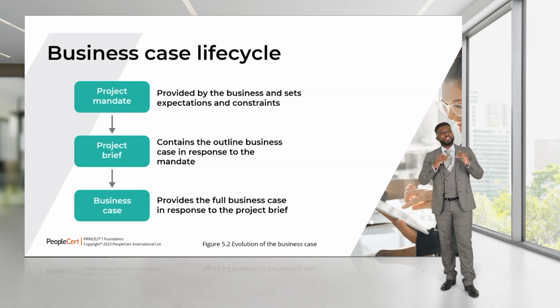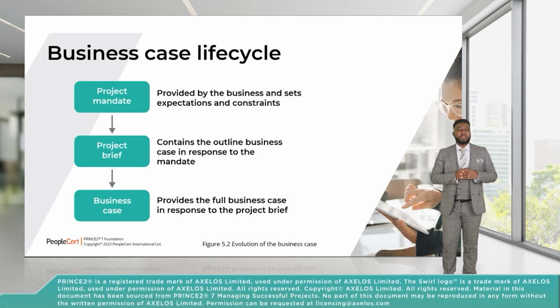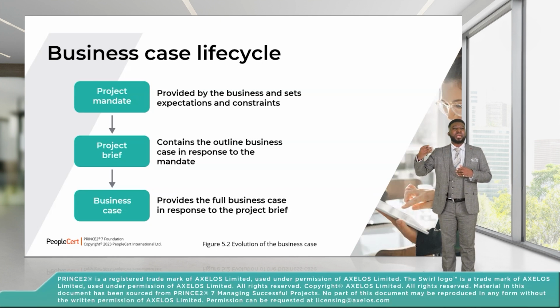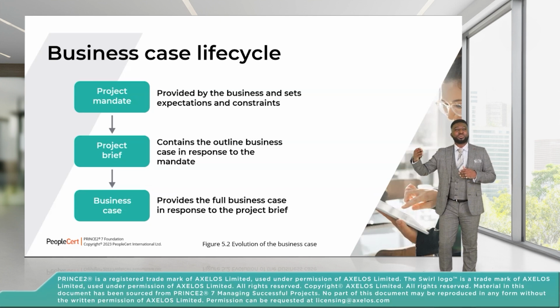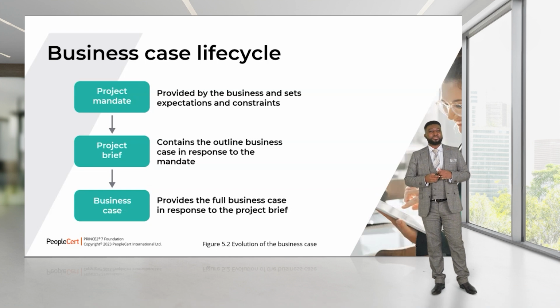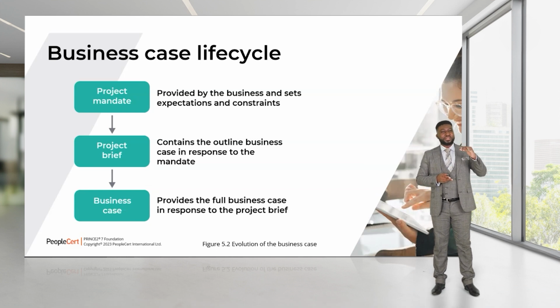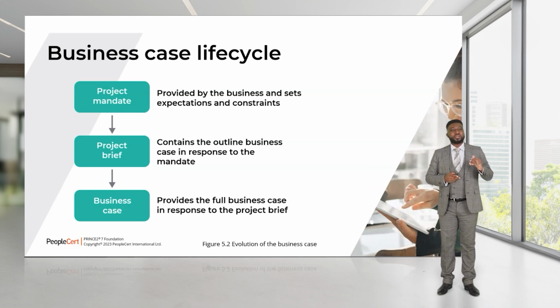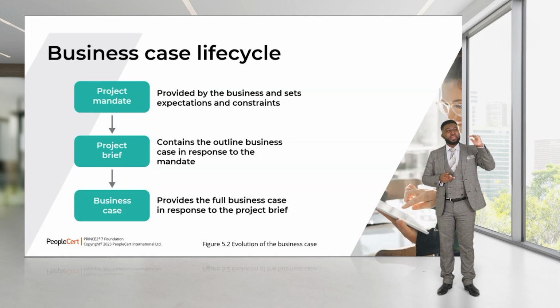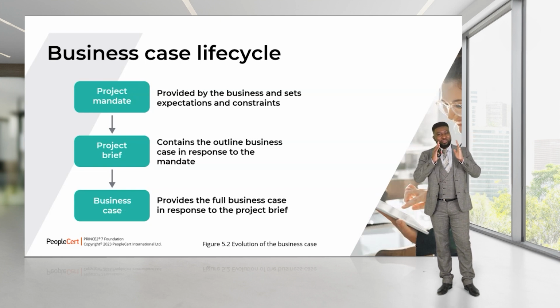By the end of initiation, we would have baselined our business case. From that point onward, we're merely going to be updating it as we go through the stages. So that's the general life cycle of the business case. In startup, you would have done your outline business case, and in the initiating a project process, you will have a full business case, which will then be updated as we go through.